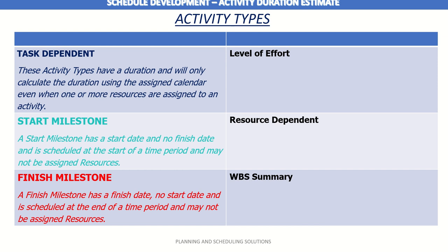Usually we don't have successors for that, unless we have a situation where we have an intermediate milestone that gets linked to a final milestone. So there will be a relationship between those two milestones, and in that particular situation we really cannot say that the finish milestone doesn't have any successors. But as general knowledge, a finish milestone usually has predecessors but not successors.